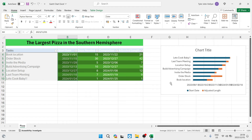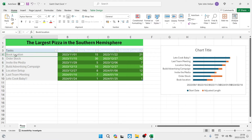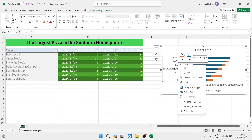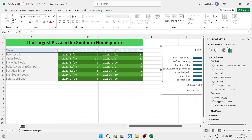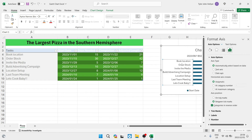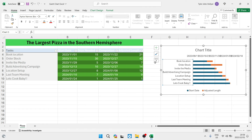Next, look at all the task headings. The way they've been placed, the location booking — which is first on the list in our sheet — is now at the bottom of the list in our chart. So we're going to swap the order around. Select the task axis, right-click, and all the way down look for Format Axis. At the bottom you'll see Categories in Reverse Order — check that box. Once checked, you'll see everything swaps around. Close that panel and it's looking a little bit better.